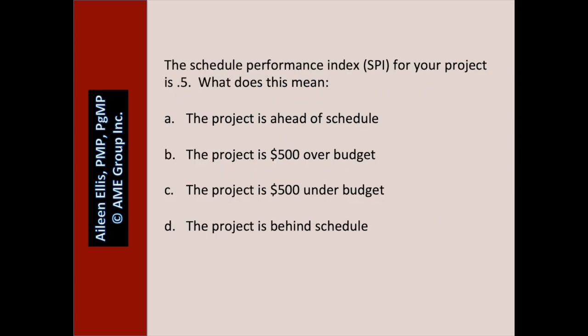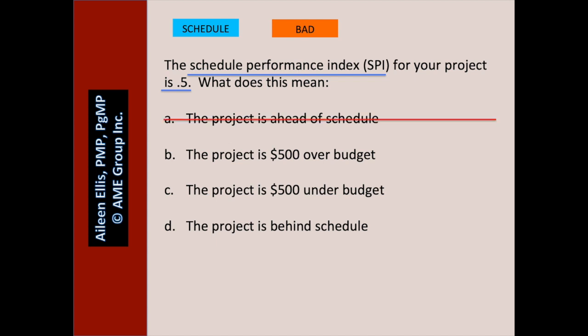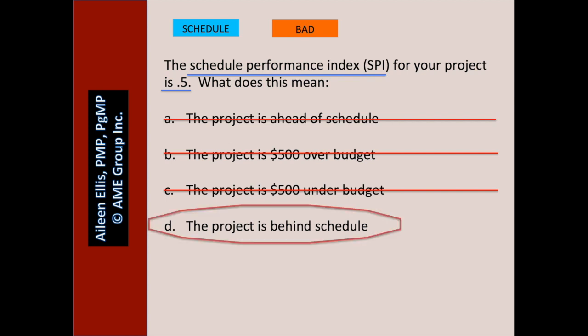Schedule performance index for your project is 0.5. What does this mean? Pause the video and answer the question. Is this about schedule or cost? It's about schedule. And is this good or bad? This is bad because it's less than 1. A: the project is ahead of schedule — no, because the index is less than 1, so the project is behind schedule. B: the project is $500 over budget. C: the project is $500 under budget — we don't know because we have schedule performance index, not cost variance. D: the project is behind schedule — that's the best answer.